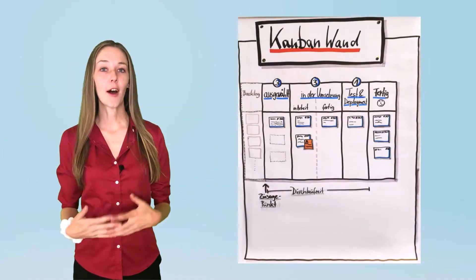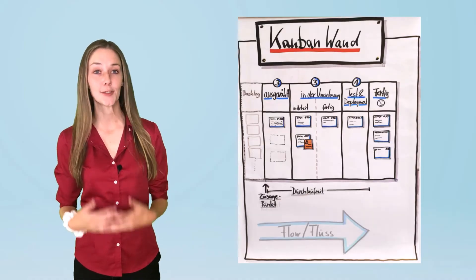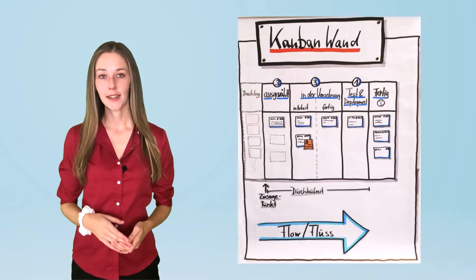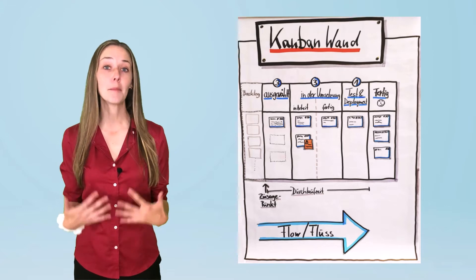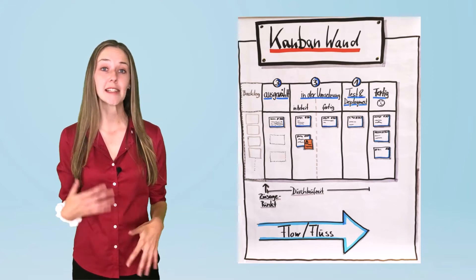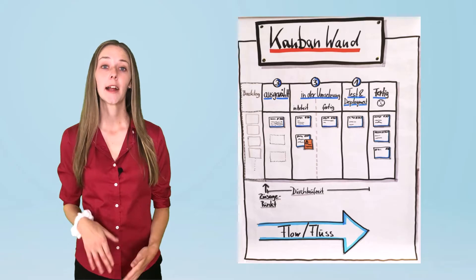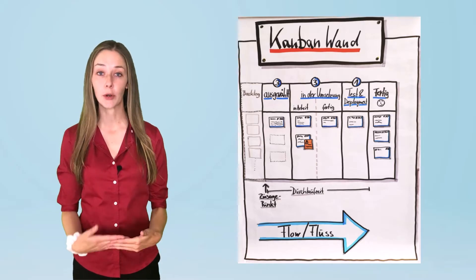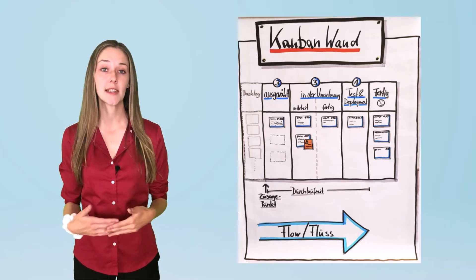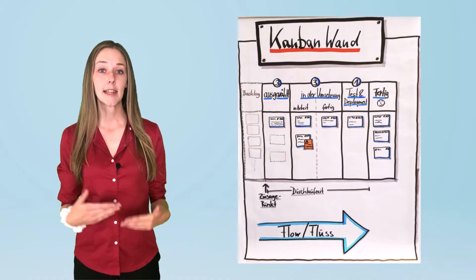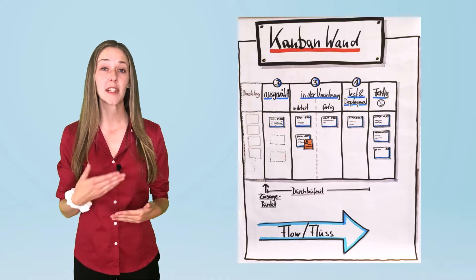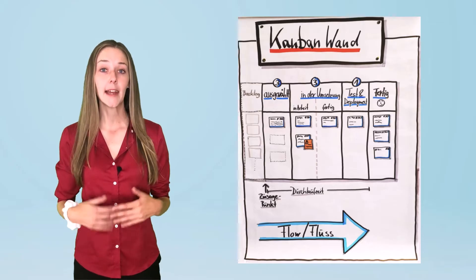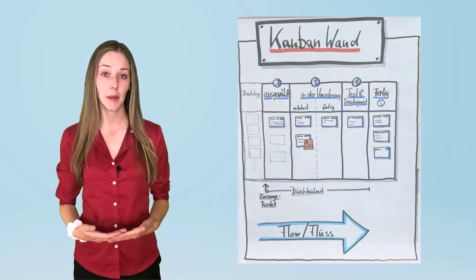This is why Kanban is often referred to as a flow-based, just-in-time development methodology. Feature development is not boxed into time-limited sprints. Feature development is continuous and ongoing. The most critical features are developed first, providing what's needed just-in-time for the client. To capture the work that's being done, the work that's been completed, and the work that needs to be completed, Kanban uses something called a Kanban board. It makes the process very visual.